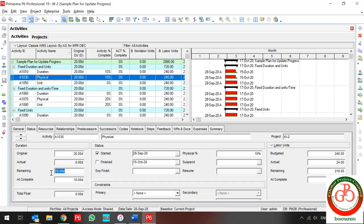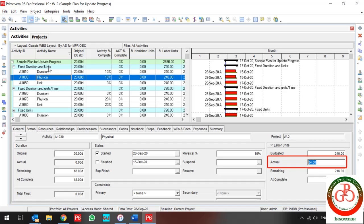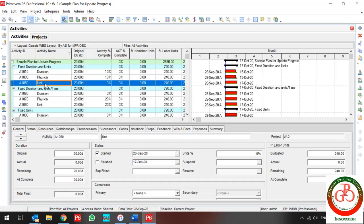When I update the remaining duration to 18 days, the actual changes automatically. Why? Because my activity is Fixed Duration and Unit — if I change my duration, my units are updated. Now, what about the activity with Unit type of percent complete?